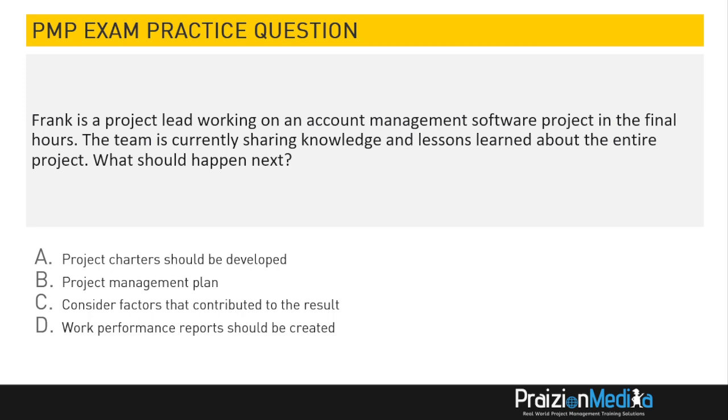Let's examine the answer. So, it says, the team is currently sharing knowledge and lessons learned about the entire project. So, what could happen next is not going to be project charters developed or a project management plan. Neither is it going to be work performance reports being created. Those things have already been done. You are in closing. Says the project is in the final hours.